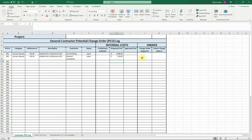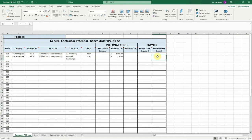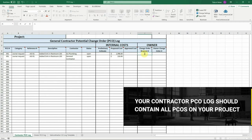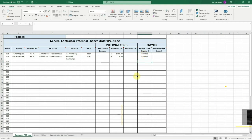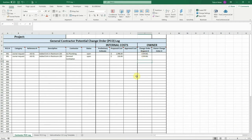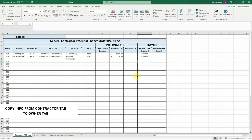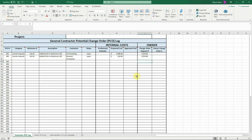The cost to owner section is where you'll track the owner change order request number and the owner change order number issued for this PCO. Remember, your contractor PCO log should contain all the PCOs on your project. That means internal PCOs and owner PCOs. Any PCO that will be presented to the owner will be simply copied from the contractor PCO log to the owner PCO log in summary format. You should not place any PCOs on the owner log that you do not want to present to the owner.